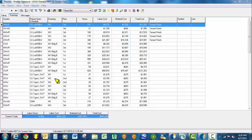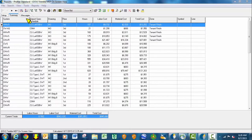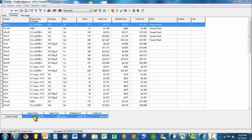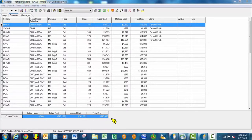When you first come into the reports in Autovid Mechanical, you have the Standard Profile. When we did the calculation for this particular Standard Profile, which is our base comparison against the original takeoff, nothing has been changed. We went according to all of the specifications that the owner required, and we calculated it out with a total of 8,760 man-hours, labor cost of $543,129, material cost a little over $300,000, for a total of $845,000.